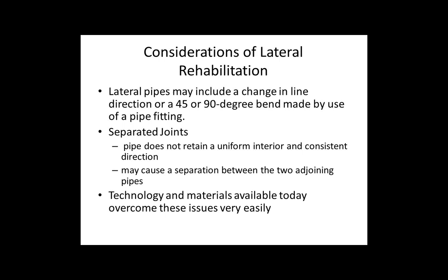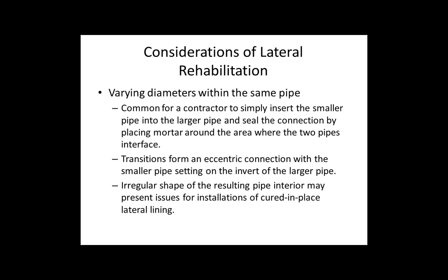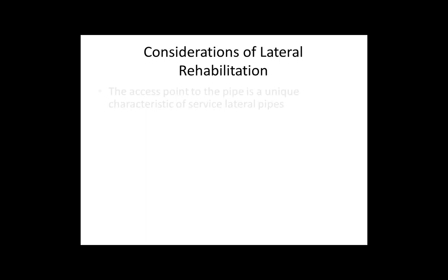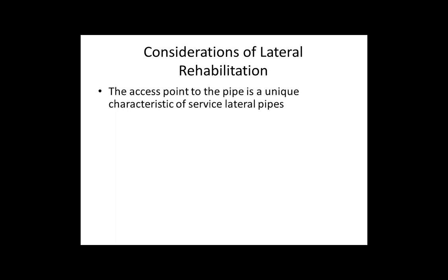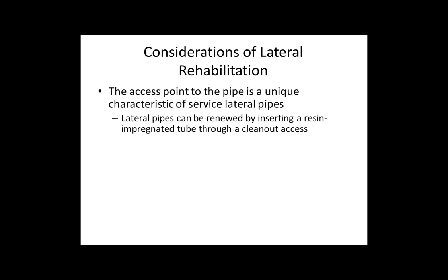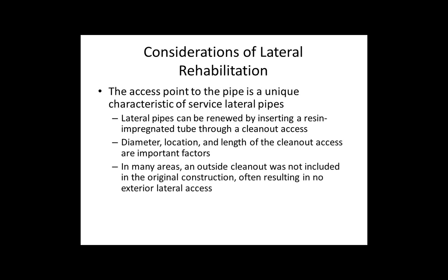Varying diameters within the same pipe present a common challenge. A contractor may simply insert a smaller diameter pipe into a larger pipe and try to seal the connection with mortar. The transition forms an eccentric connection where the smaller pipe ends up sitting on the invert of the larger pipe, presenting issues during rehabilitation. Also, access to a lateral pipe is a unique characteristic — unlike mainlines accessible through manholes. Technology today allows renewal of lateral pipes by inserting a resin-impregnated tube through a clean-out; however, the diameter, location, and length of the clean-out are very important. We strongly recommend a lateral access point be created before rehabilitation work is undertaken.